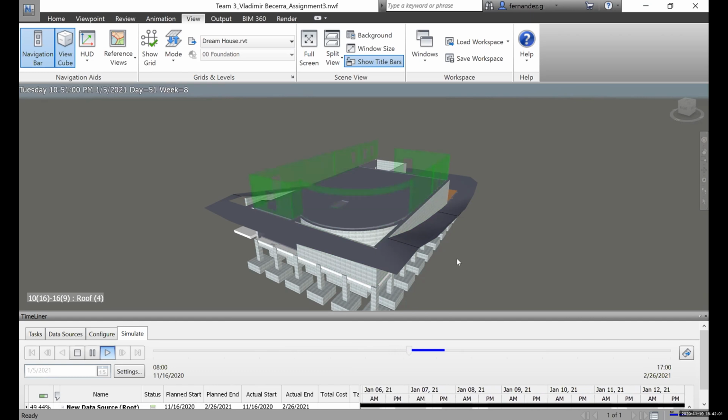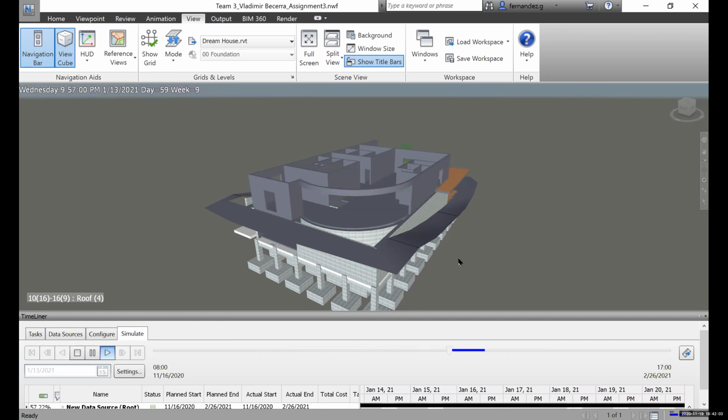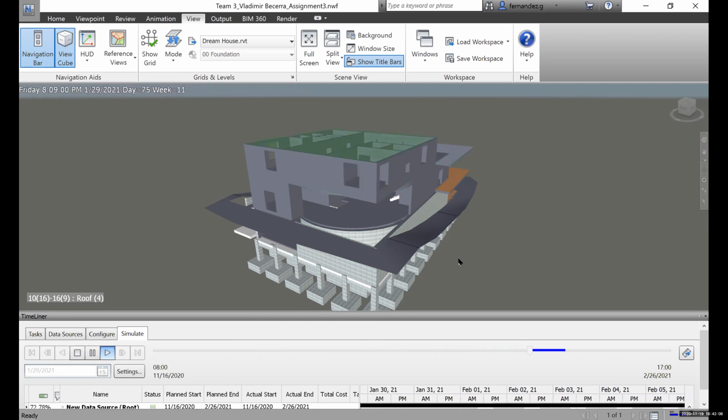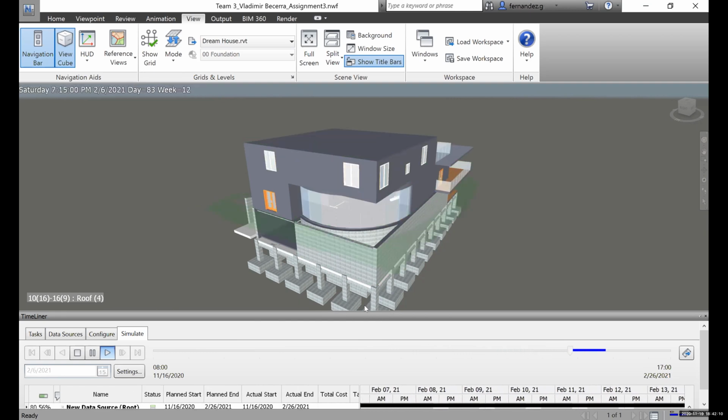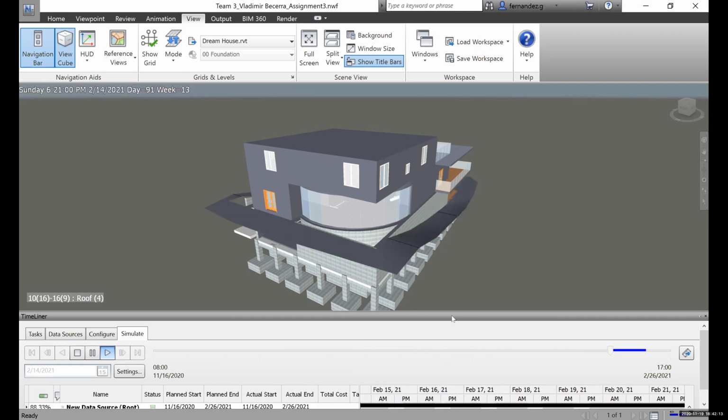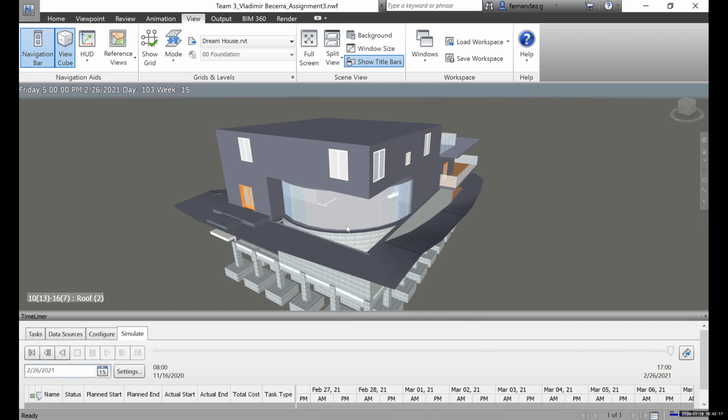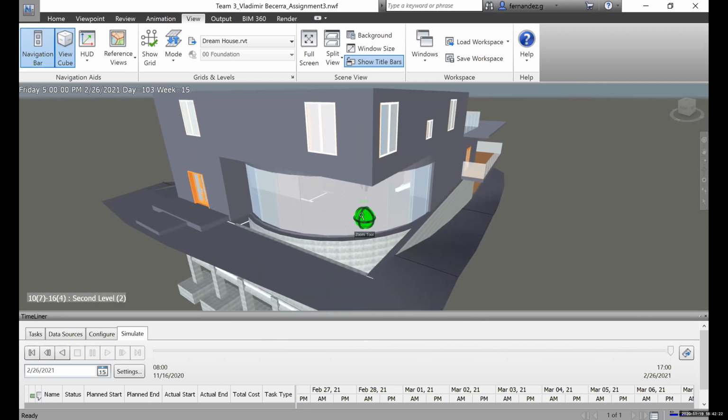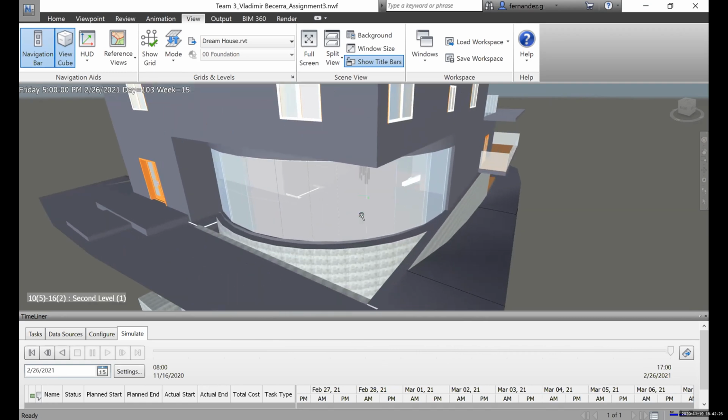After that, we start with the exterior walls of the house to get the support of the floors. Then we do the interior floors of the house to start making the house look more like a house. After finishing all the structural parts of the house, we did the little details of putting in the lamps, lights, doors, and windows, which are mostly done at the end of the project.